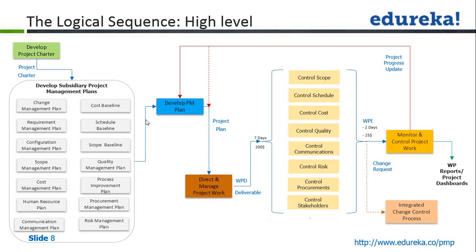Okay. Krishnan has a question: in developing the PM plan, who all should we take on board or consider before arriving at a meaningful plan? From my experience, you need not include the entire team, only the senior project team members. For example, if you come from IT, from the programming or development side, you may have a team of 30 programmers in your project. You need not include all those 30 programmers, but you may want to take input from your team lead there. Again, this is subjective, but ideally it should be the senior team members, not each and everyone.